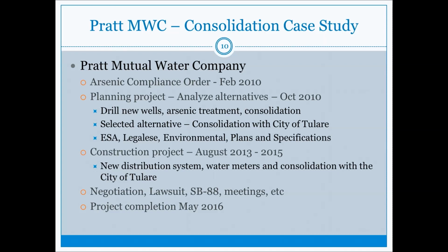So to move through the timeline there, Pratt received an arsenic compliance order in February of 2010, and shortly thereafter embarked on a planning project which analyzed alternatives of drilling a new well, doing arsenic treatment, or trying to consolidate with the nearby city of Tulare. And the preliminary engineering report and the community decided that consolidation with the city of Tulare, if it's available, would be a fantastic solution.